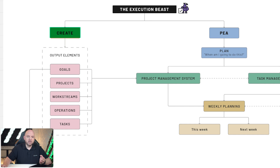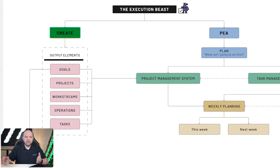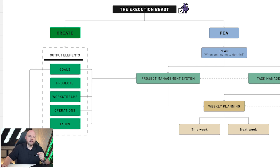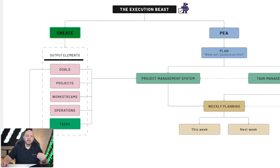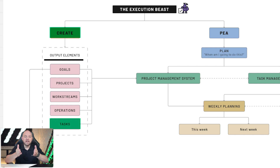Let's start with Create. Here you see the output elements — goals, projects, work streams, operations, and tasks. The only important thing to keep in mind is that tasks is the only entity that is actionable. That's the point where you actually do things. All the others are just containers holding tasks. And if a task becomes too complex, you can add subtasks, making the task itself a container while the subtasks become the only actionable items.